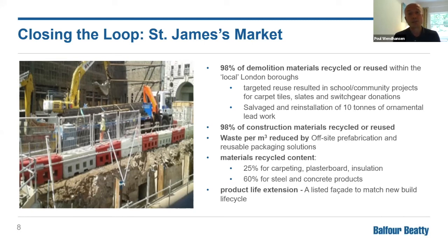So that's reclaiming, but again, it's that lower value, unfortunately. It's not a bad thing, though. It's not just getting chucked in a landfill, and these are things that we're already good at. Waste per metre queued was reduced by off-site prefabrication and reusable packaging solutions. So again, that was really upfront thinking about how it was going to be delivered, and having the time to get that in place and get the supply chain solution in place. Recycled content of materials was 25% for carpeting and plasterboard installation, and 60% for steel and concrete products.